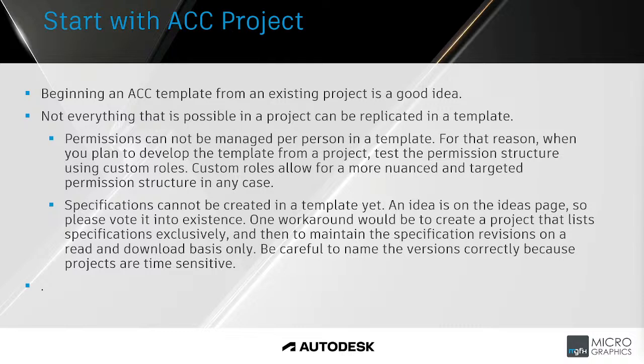One workaround would be to create a project that lists specifications exclusively, and then to maintain the specification revisions on a read and download basis only. Be careful to name the revisions correctly because projects are time sensitive. So where might that come into play? Something like your South African building standards. Maybe another standard for your industry that is released by the South African Bureau of Standards or South African National Standards, and from year to year they might do a revision, one or two extra clauses, maybe a few amendments, and we'd like to keep track of that.